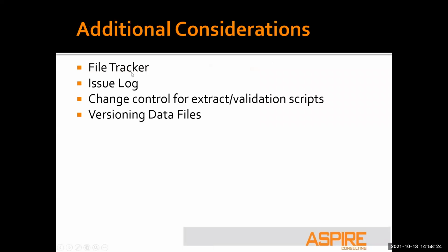Okay. All right. So there's a couple things I just wanted to throw out there, just some food for thought items for you. I don't know where you all stand in the process of potentially going to Workday, but it doesn't even really matter if it's Workday or Oracle or wherever you're going next. I find it very helpful to have a file tracker, and that can just be a simple spreadsheet of all the files that we need to create for each build.